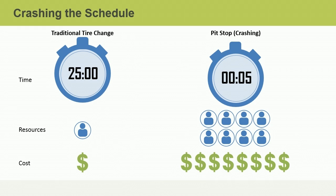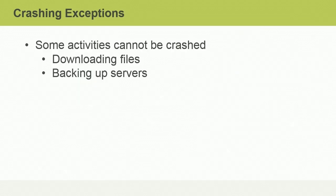Crashing is expensive, but it is a great option if your schedule is the top constraint for your project. It is important to understand that not every activity can be crashed. Activities such as downloading files or backing up servers cannot be compressed by adding more resources. However, for the remainder of this discussion, we are going to assume that the activities can be crashed.